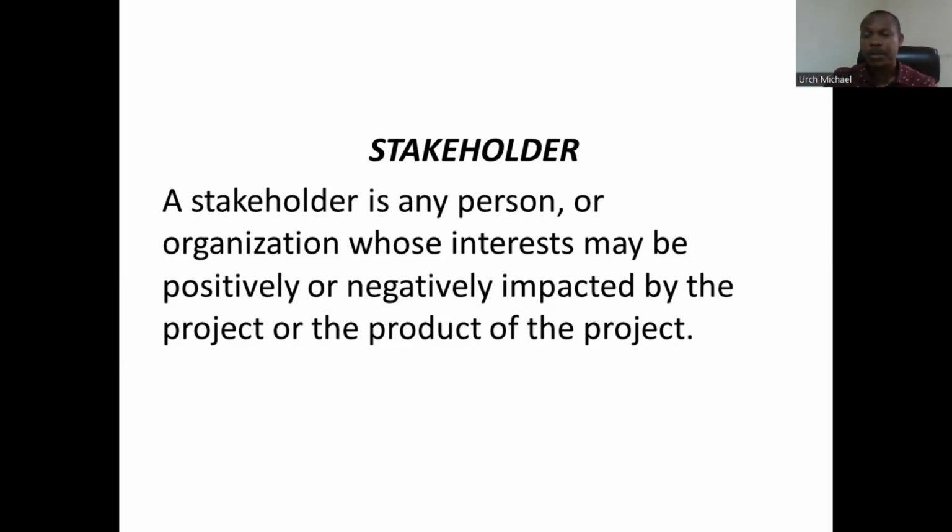For instance, if we say positively, it could be that these are the initiators of the project and they are actually going to make money from this project. So you can say it's a positive impact to them. They are positively impacted by the effect of this project. And when you say negatively, it could be a road project, and it could be that the road is going to run across already existing farmlands. Okay, and you will need to consult with the community. You will need to let them know the benefit of this road, and also the obvious negative impact, because a lot of farmland is going to go because of this road. All right, so these are stakeholders and more.